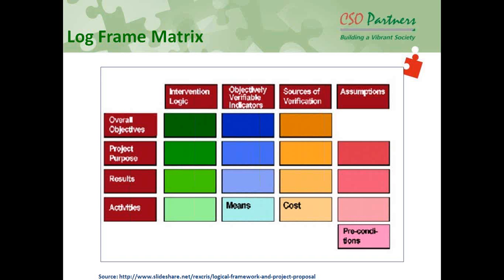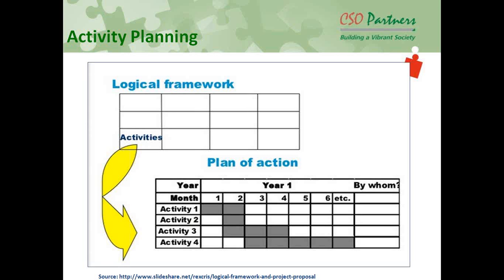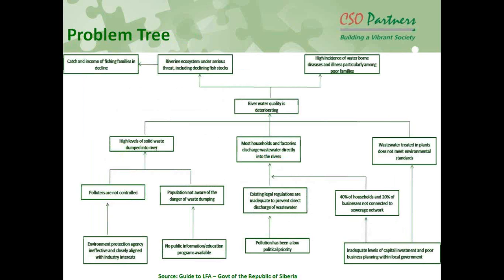then you can sequence when the output of these activities can be achieved. The activities done in month 1, the output of that can probably be expected, or the outcome can be expected at the end of the year or in 6 months' time. But when you do one particular activity at the end of the year, then your output or outcome can be seen at a later stage. So you need to understand how to schedule your activities and the consequential results in terms of output, outcome, and objective. Based on that, you can create a time frame or schedule of all these activities and results, and based on that, you can monitor your program. You can track your program progress and program impacts.